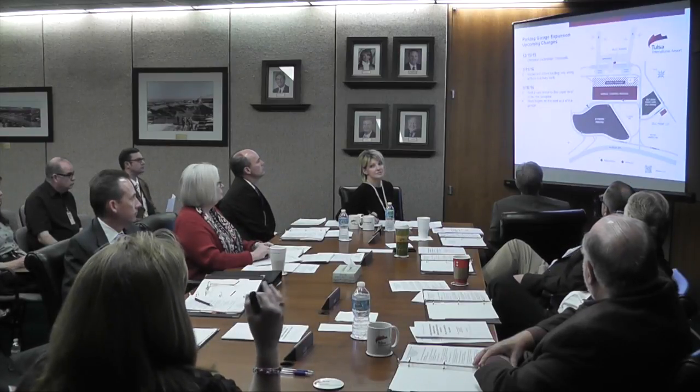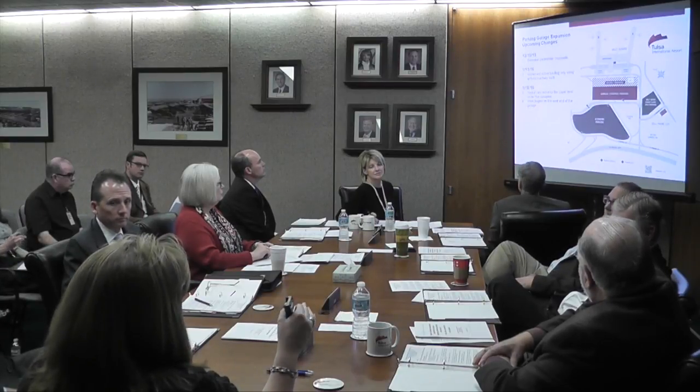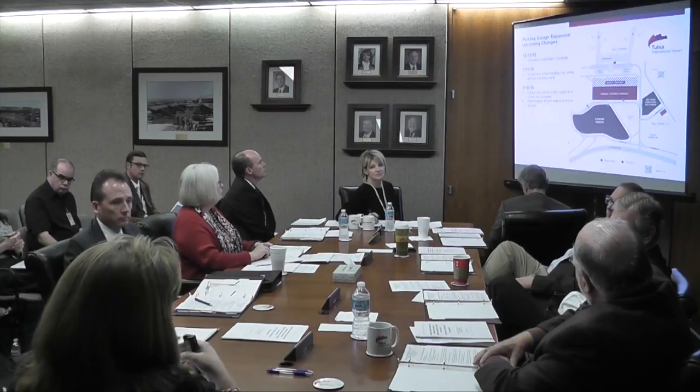They're not going to just take the whole area over and then there'll be empty spaces. As they progress on the work, they're going to start from the east end and work their way west. And so we'll be taking spaces over gradually. So people can park there when it's not being built on, and then as they move, they'll just close. As we close, of course, it'll be down until it's like in May when that corner is scheduled to be done, and of course we'll be opening a bunch of that up again.